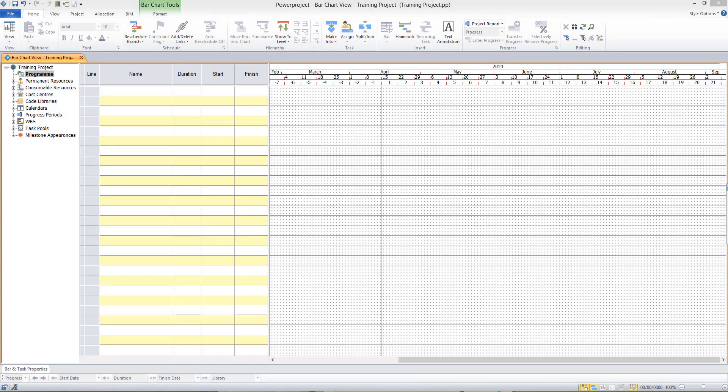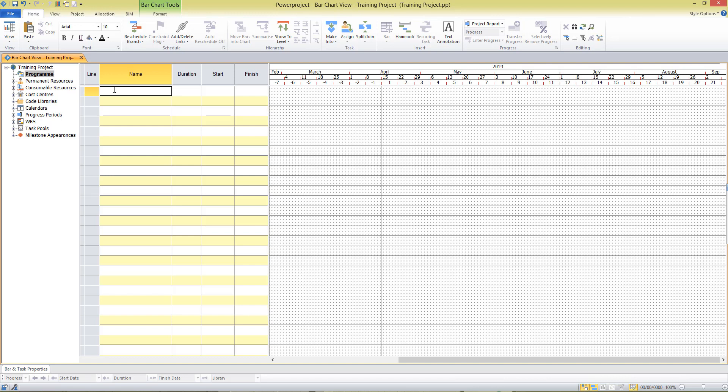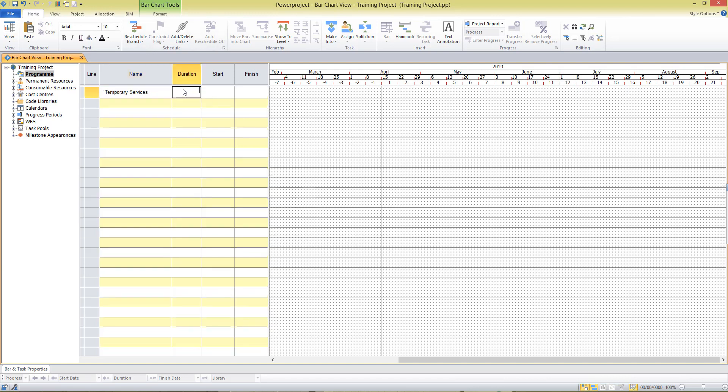In this video we'll be creating the tasks and links to plan the work in our new project. So we'll start by typing into the name column of the table our first task. We'll decide a duration for that activity and a task shows over here on the bar chart.